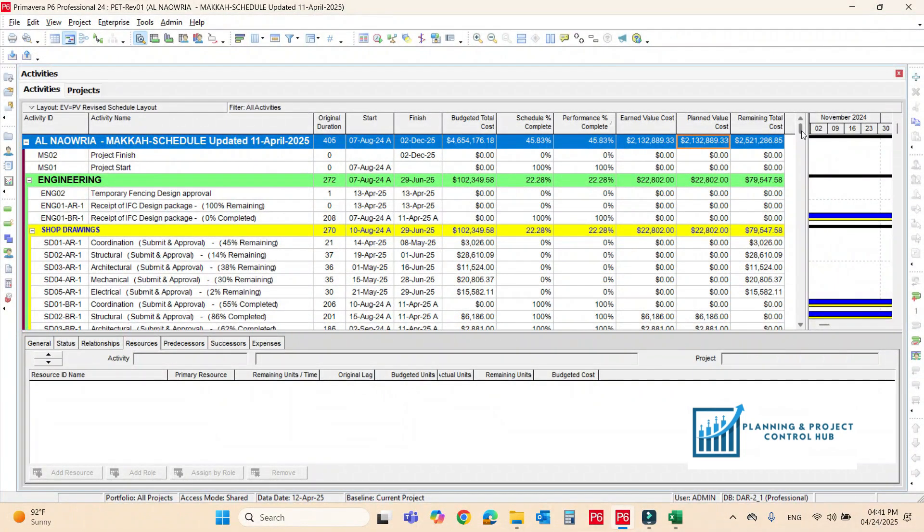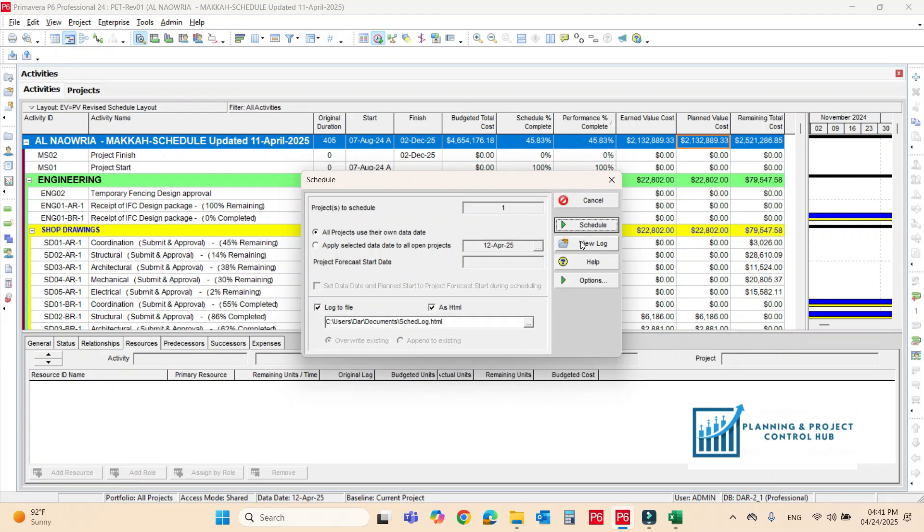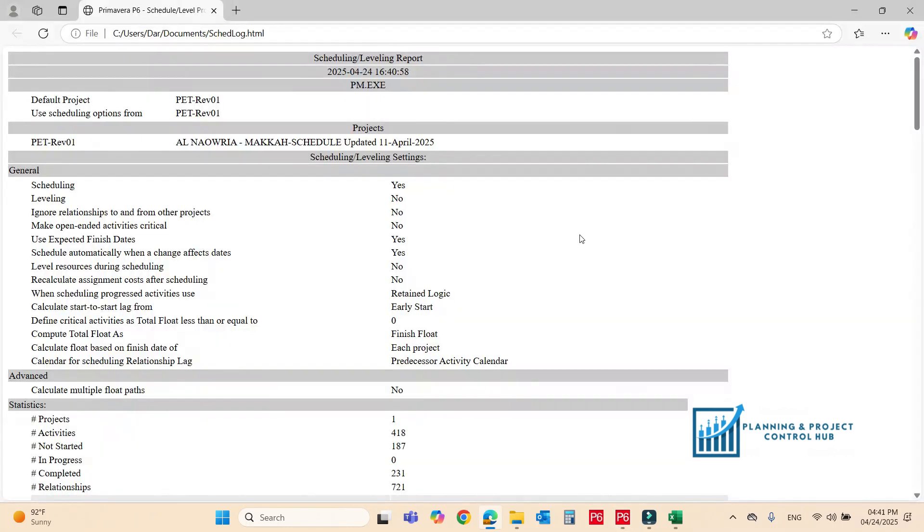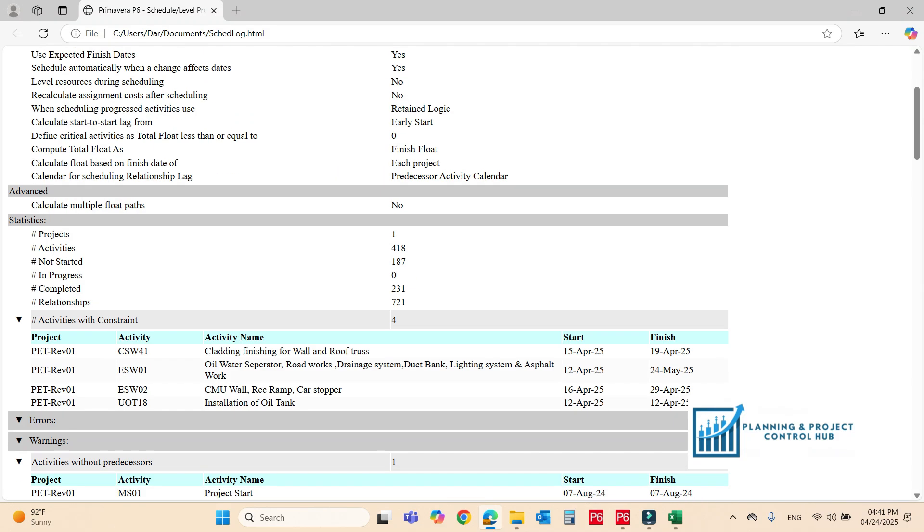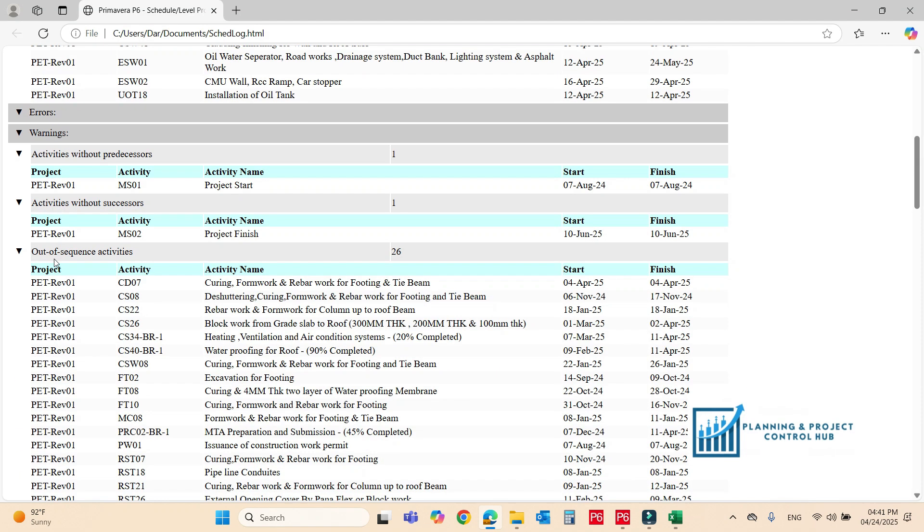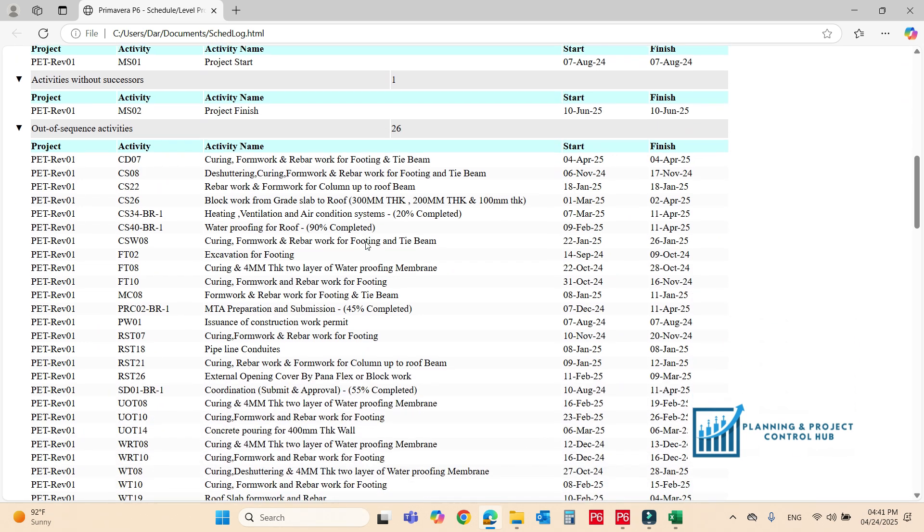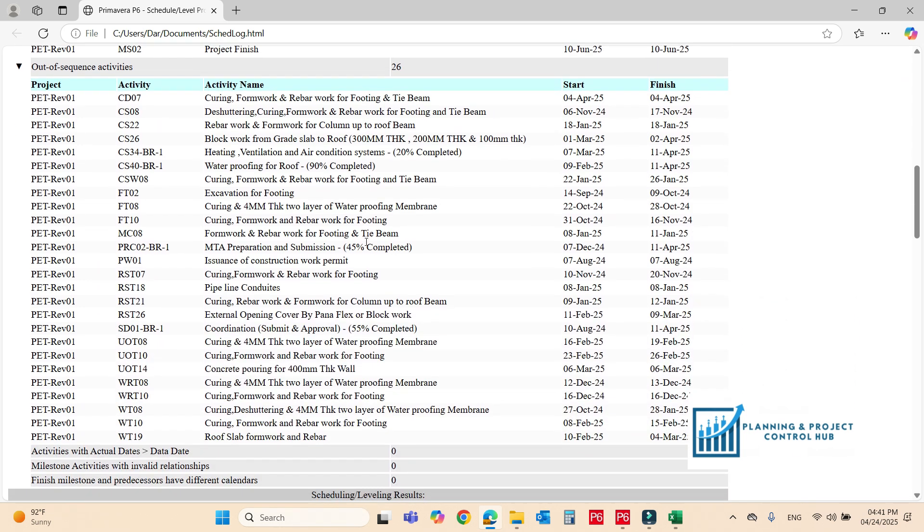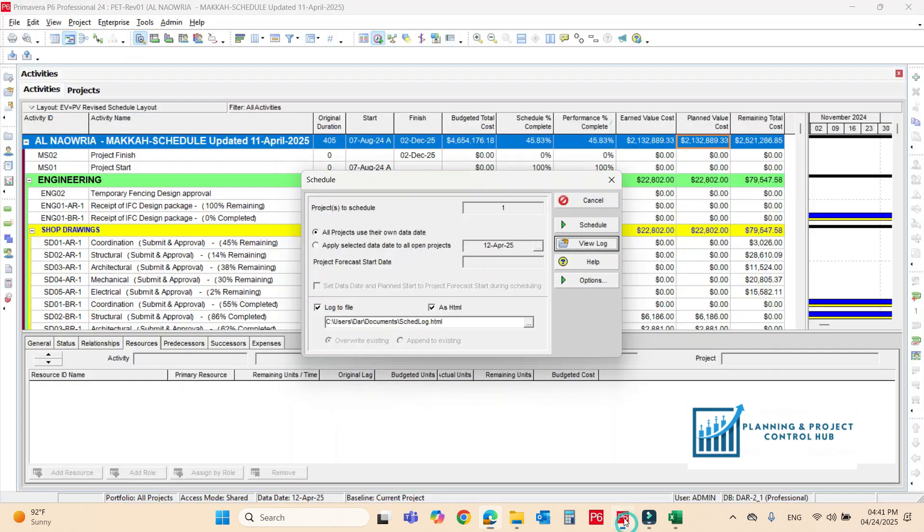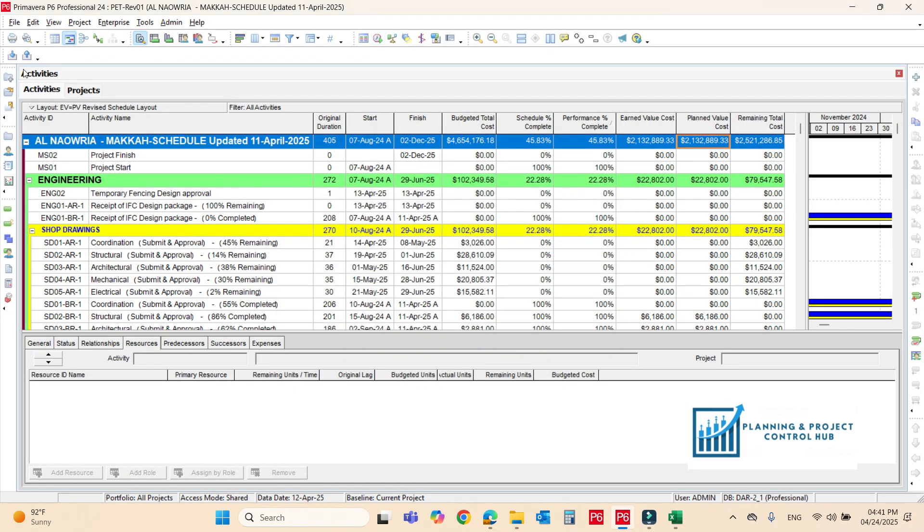Now if you see here just go to the schedule option. If we have to check the view log because maybe there will be out of sequence activities here. Yeah we have out of sequence activities here, we have 26 out of sequence activities. So before submitting the file we have to remove all these out of sequence.